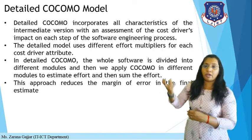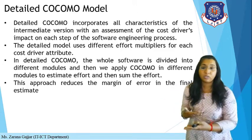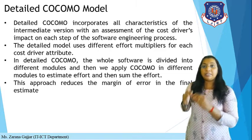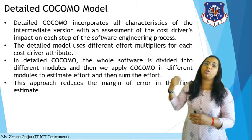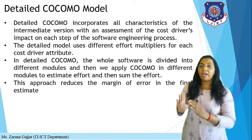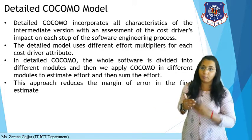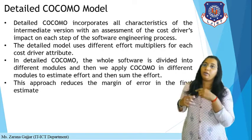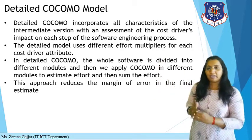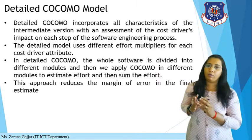For requirement gathering you need a business analyst, for designing a software engineer, for coding a developer, for testing a QA/QC team, and for maintenance a maintenance team. Each phase is calculated separately. The detailed model uses different effort multipliers for each cost driver attribute. The whole software is divided into different modules, COCOMO is applied to each module to estimate effort, and then all efforts are summed up to get the total cost.